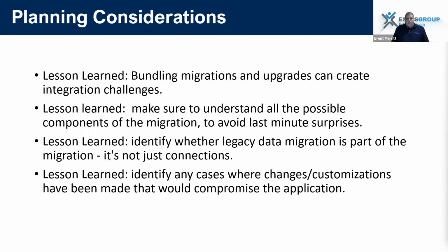I have seen migrations where at the last minute they found out that they had to have a new switch. Now you're having to order the switch, wait on the switch, configure the switch, get it all put in, and that could take an extra 2 weeks when they could have been done. So make sure that you have everything you need prior to the start of the integration or the migration.